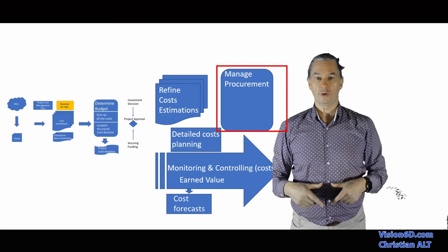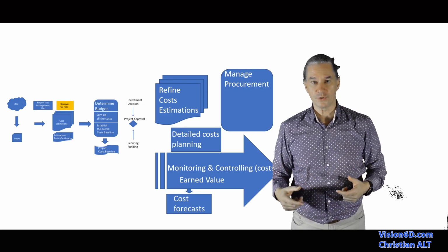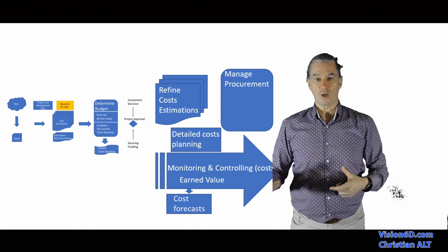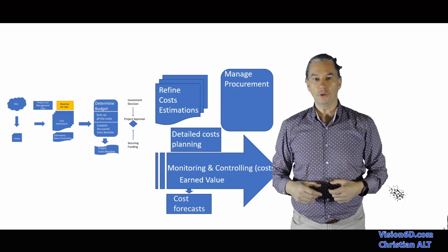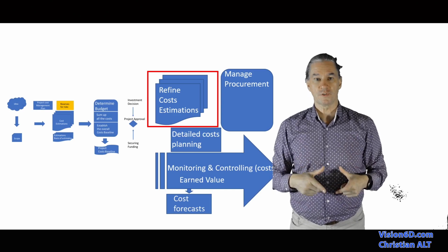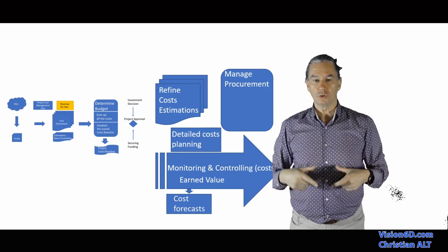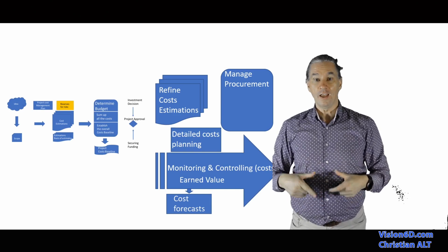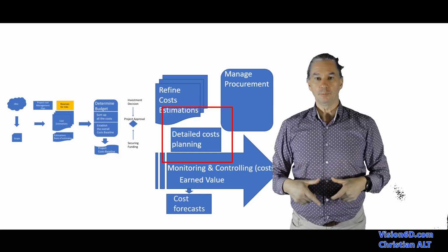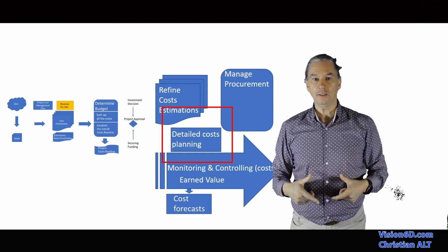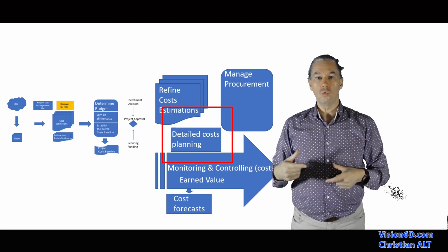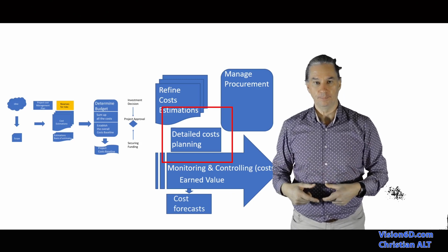For example, we are going to send calls for tenders and we are getting back the offers from the suppliers. Those offers, of course, we have to evaluate, but we will also use them to refine our costs. We'll know at that moment the real value of the costs in this project. It will also help us in preparing the planning of the detailed costs, meaning I need to know when I will spend money.